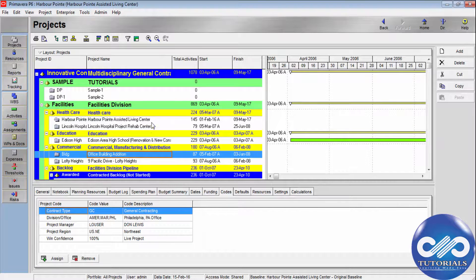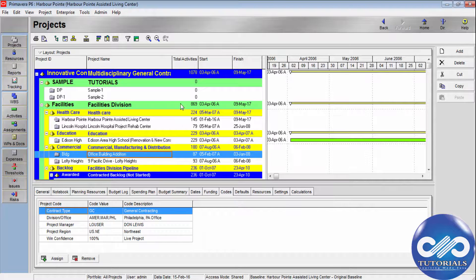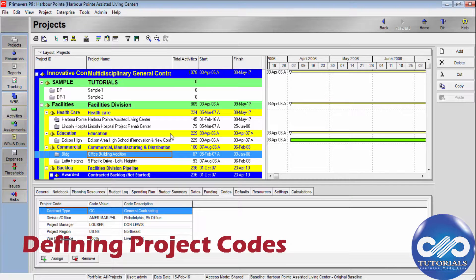Project codes are set up in the project codes dictionary, which is available to the entire organization. You can create values for the predefined codes, or you can create new project codes and values for use within your projects. Let's see how to assign them using the codes tab in project details.